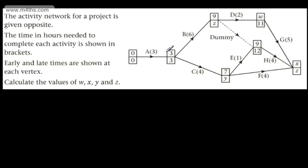Looking at this network, we can see that activity A relies on nothing — it's dependent on nothing. Therefore we can start from the source node at the beginning, with the sink node at the end. Activity A takes three hours, which tells me the earliest time we can start B and C is going to be three hours. So this is the early event time for that node.